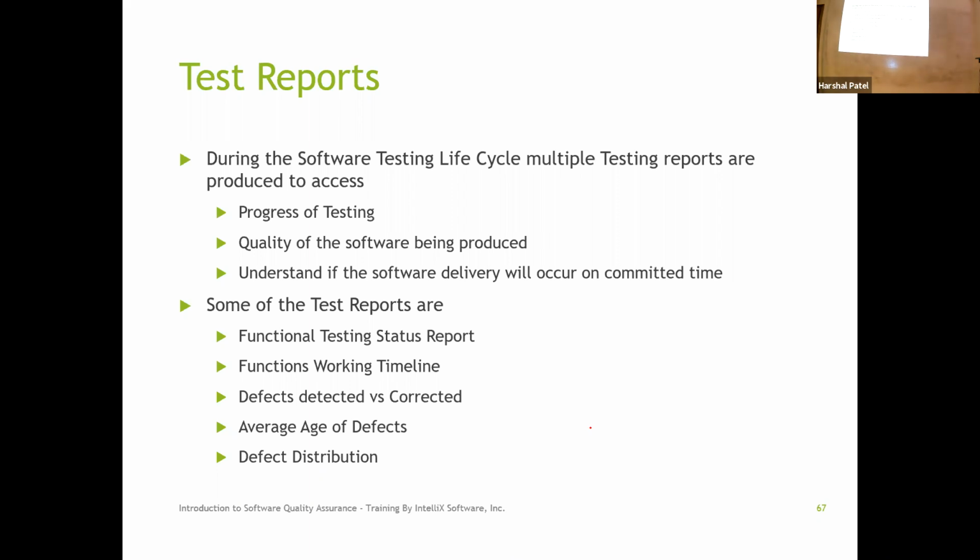That's fairly easy to measure. If you're in a waterfall world, that's where it gets tricky, because I need to make sure I'm providing the right progress for the testing. Somebody else is writing the code while I'm writing the test scenarios and test cases. So when they're ready with the code, if I'm not ready with all the test cases, then there is additional delay.